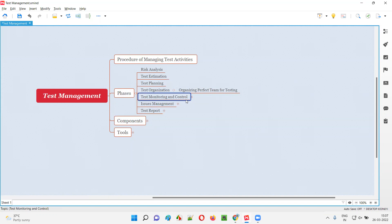Then test monitoring and control. Test monitoring means seeing how the testing progress is going on — what is the current state of testing, whether the quality is good, whether things are going well or not. If any problem is identified, such as testing not being done on time or defects not fixed on time, we monitor that. If any problems are identified, we have to control them — meaning bring that particular problem under control so things go well.